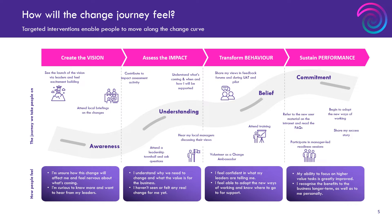Here's also an example of a change journey. When you're crafting your communications plan, try to think about the overall journey that people will be going on. We've talked about moving from the awareness phase, to understanding, to belief, to commitment. You want your communications content to help people progress through this journey. Up front you're just building awareness — don't overload them with information. Later on comes in-depth understanding, then in the belief phase it's about bringing things to life through success stories and demonstrations. Then it's showing commitment and supporting it through success stories. Thinking about the change journey alongside your change plan and communications plan is always really helpful.